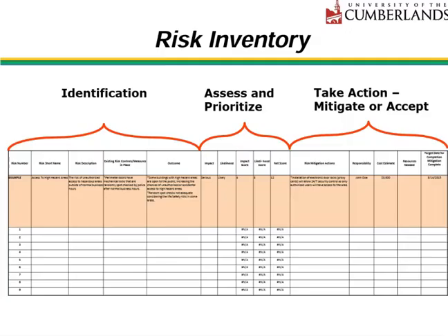Then we have risk description, which provides a detailed explanation of what the risk actually is. Then we have existing risk control measures in place. So this column is used to document what we're already doing to manage this risk. This is important because we're not starting from zero. We need to understand our current state before deciding on additional action.